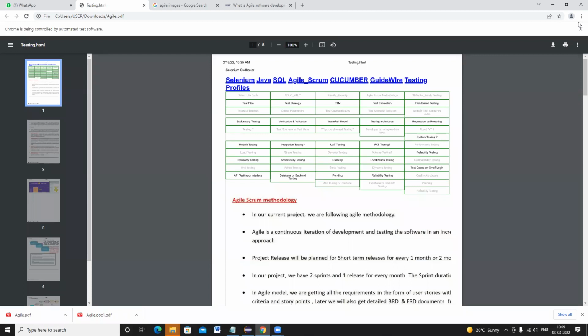Because it has to be deployed pan India wise, and that too on a single date, because the release date was fixed, the time was fixed, and the duration was also fixed. So deployment pan India and taking the load, whether the software can take that much load or not. Everything, we had multiple rounds of discussion, based on which we came up with the decision that we will release the product in a module base.